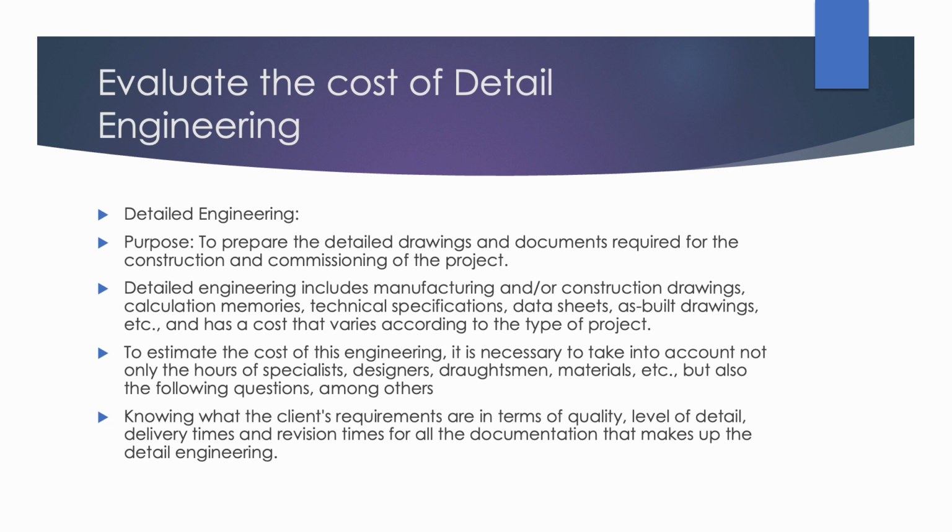To estimate the cost of this engineering, it is necessary to take into account not only the hours of specialists, designers, draftsmen, materials, etc., but also the following questions. Among others, knowing what the client's requirements are in terms of quality, level of detail, delivery times, and revision times for all the documentation that makes up the detail engineering.